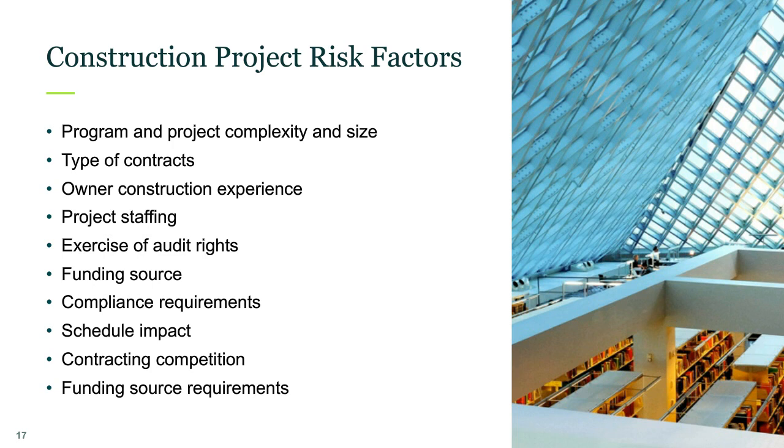And we'll do a couple more. Project staffing. This applies to both internal and external. So does your program have too much or too little? If it's too little, then you may not be supporting a successful project. If it's too much, you may be incurring more charges than you need to. So I find developing and approving a yearly staffing plan for both internal and external staffing based off, let's say, construction activity for a project that's in the mix can help you improve overall operations and keep overall costs down.